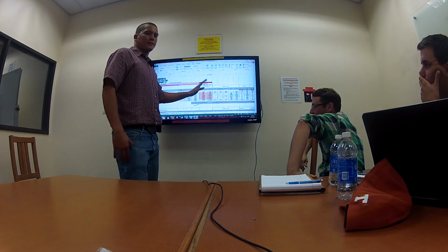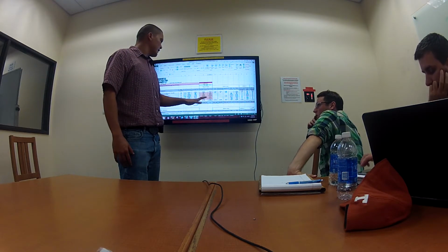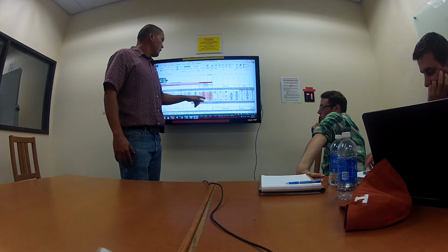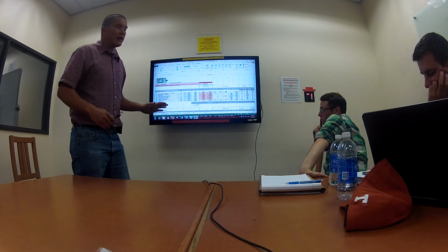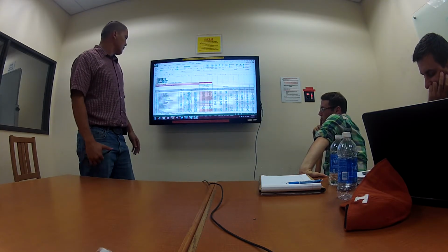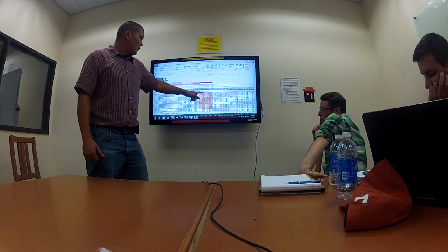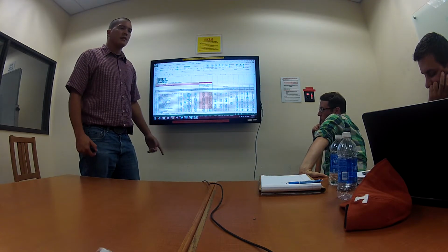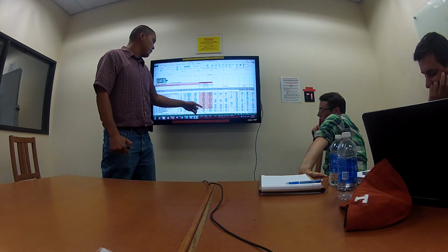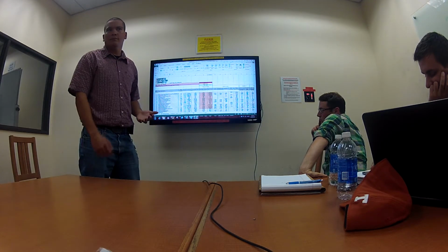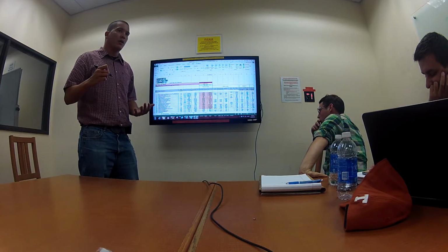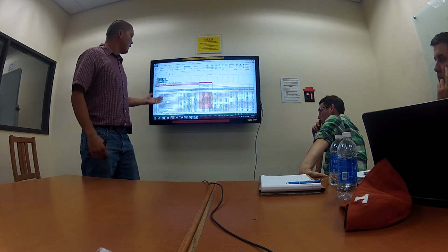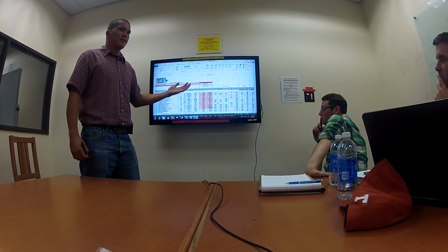I know this one's messed up, and unfortunately that's the way it is. This is where you're going to start closing out items earlier in the day. Scroll up so you can see the whole screen a little better. The orange ones are locked items. We picked a price and said, it's an hour until bid close. We need to start closing out items and getting them inked into our book, because we're not going to have time to write in this many numbers at the end.